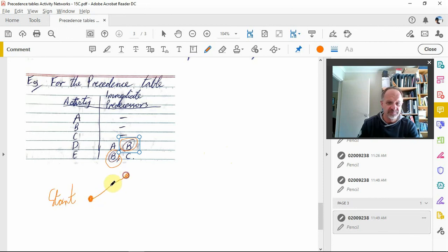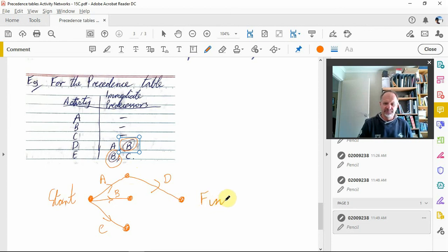And I know that A, B, and C are all at the start. Then after A, we've got D that occurs. And then because D is not a predecessor to anything, after D occurs, we get to the finish. Now for E, I'll get back to these B's in a minute, but E has C as a predecessor, which is here. And it's not a predecessor for anything, so when it's done, we're at the finish.